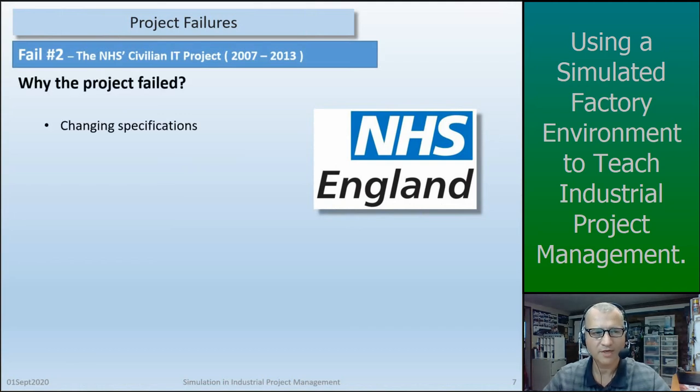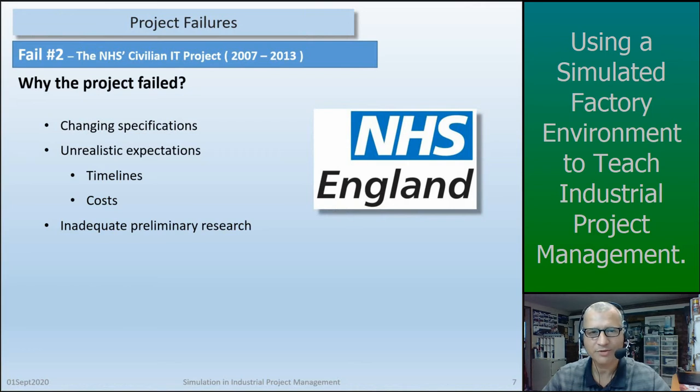So why did the project fail? Well, it failed because of changing specifications, unrealistic expectations, such as in timelines and costs, inadequate preliminary research, and failure to conduct progress reviews.